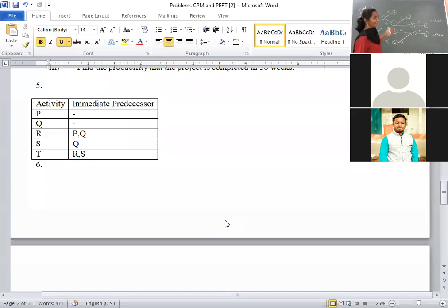But being a project manager, you have to draw both diagrams, as well as know which one is beneficial. Here, the above diagram consists of 2 dummy activities. It will consume more time. The second diagram has only 1 dummy activity. That's why, instead of drawing this, it is better to take this way. Clear?